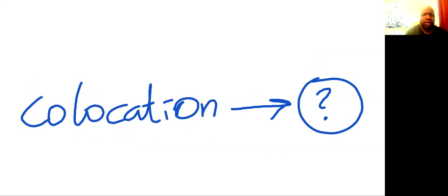Well, when you think about colocation, why do you colocate the team? To get them to burst through the 5 stages of team development quick. You don't want them to get to storming and stay in storming. You want them to burst through storming, get to performing, and then start doing great things.